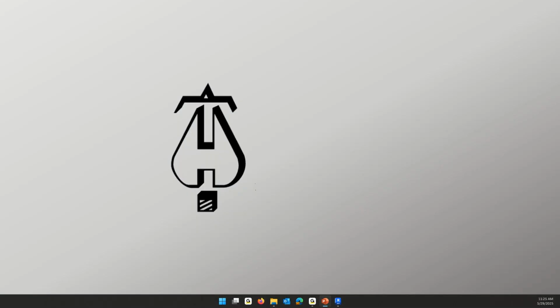Okay, workflow 2 is the project manager says, everybody send me your stuff. You've been working on your stuff. I want you to send it to me, and I'm going to put it all together in Navisworks, and we're just going to fly around and look and see if we find any problems, and then I'll send you off to fix them, and then we'll put them back in the Navisworks file, and we'll look again and convince ourselves that they were fixed.